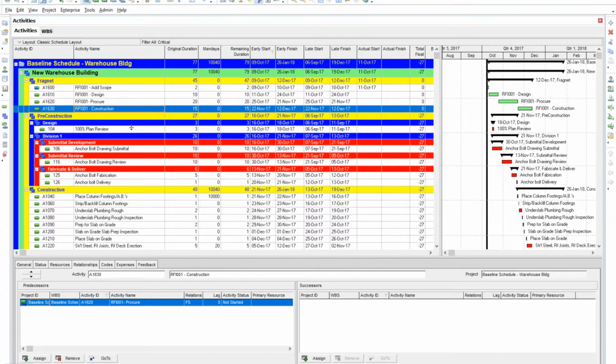Once that occurs, we review the negative float on the last activity, which is typically the contract completion date, and then we subtract the negative float that we had on the schedule update. In our case, we had 69 days. We subtracted the 27 days that was part of the last schedule update. Now remember, if you expect to get compensated for that 27 days, you're not going to subtract it.